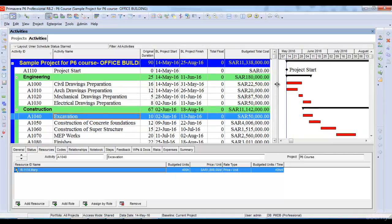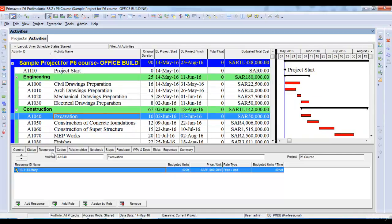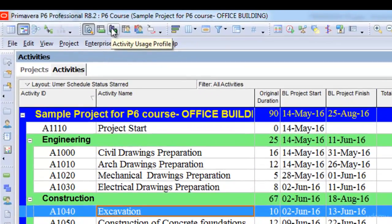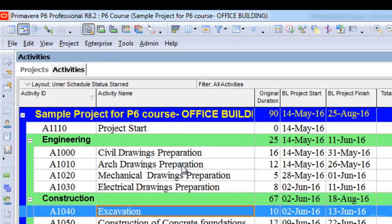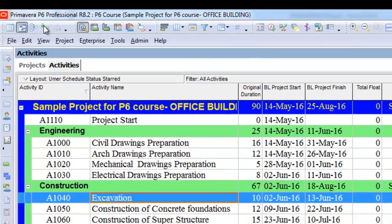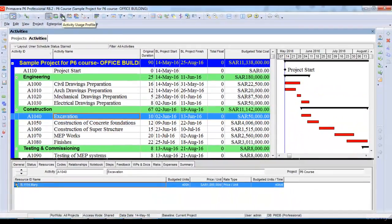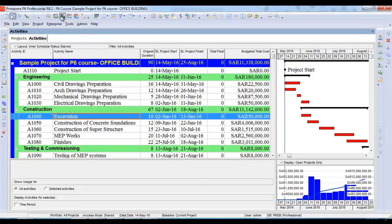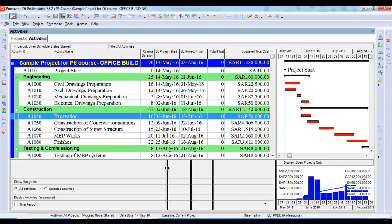If I want to see the S-curve or the progress curve of my project, I need to go to this option, which is known as the activity usage profile. To see my project budget in graphical view or the S-curve of my project, I need to select the activity usage profile option. I'll go to this activity usage profile option and click on it.